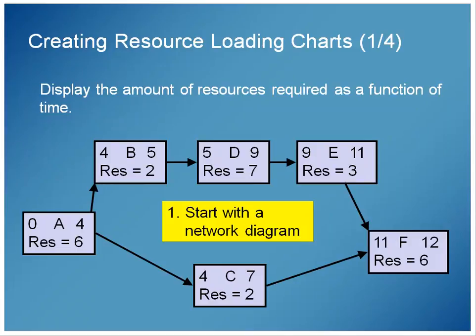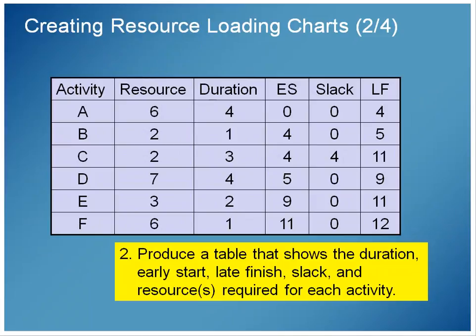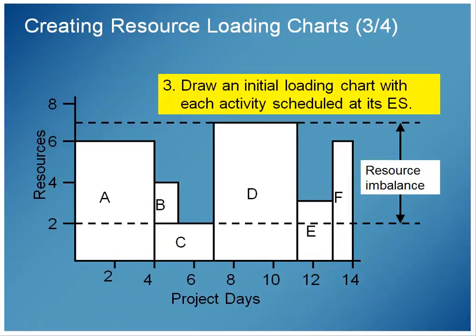So just stating that resource loading chart process again here in a quick summary, a 4-step summary. First, start with your network diagram. Based on that network diagram, produce a table that shows the duration, early start, late finish, slack, and resources. Okay. Draw your chart.